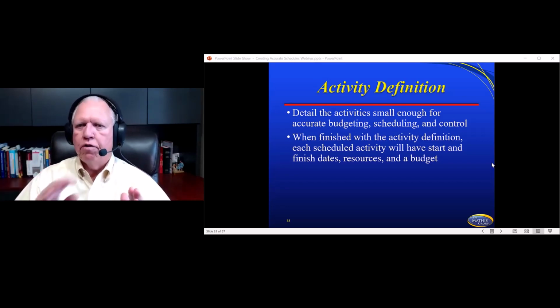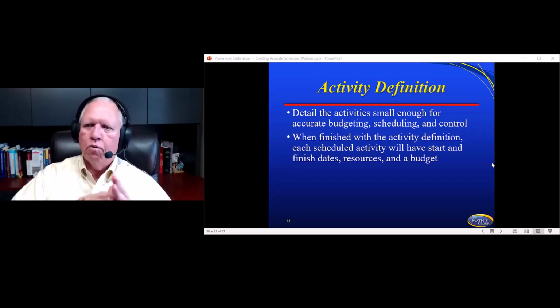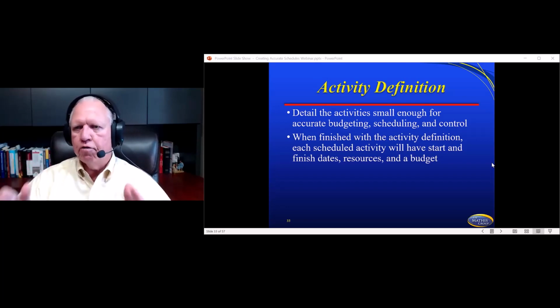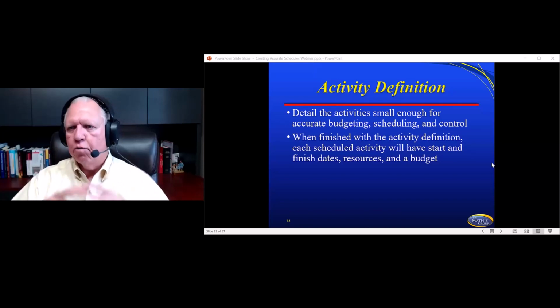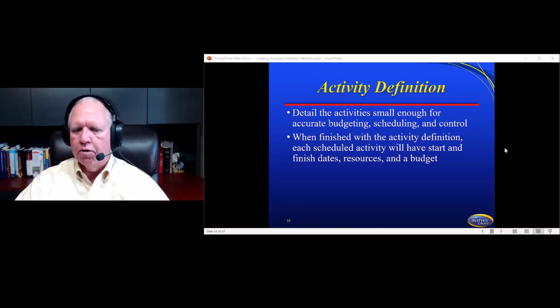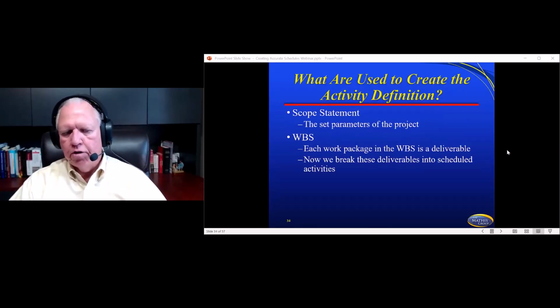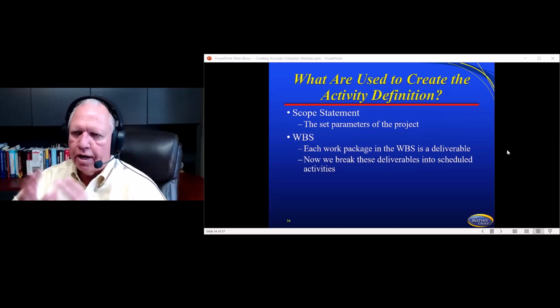Did we consider the other projects? Did we consider what time of year it is? Did we consider what's going on with this person in their life too? Because it might be 10 days of work effort, but it might actually take 15 to 20 days to be able to get that work done, get that work out of them because of all the other projects that are on their plate. So what are used to create those activity definitions?